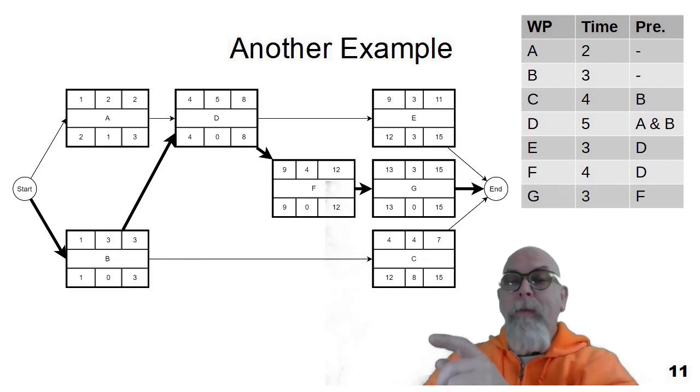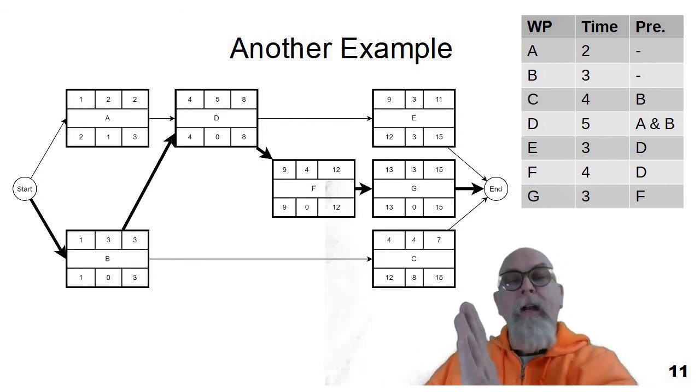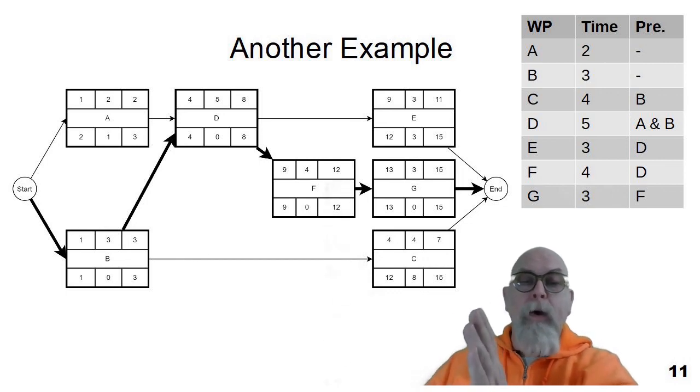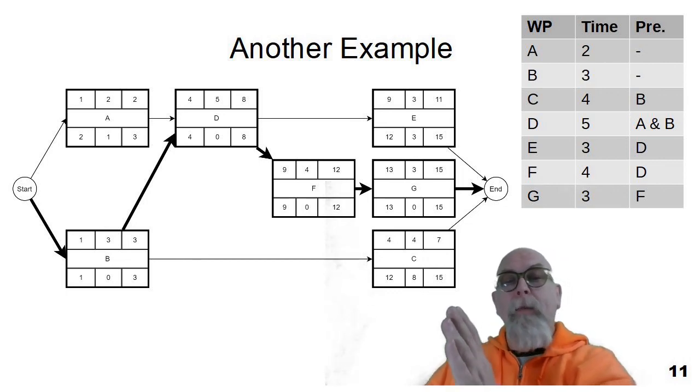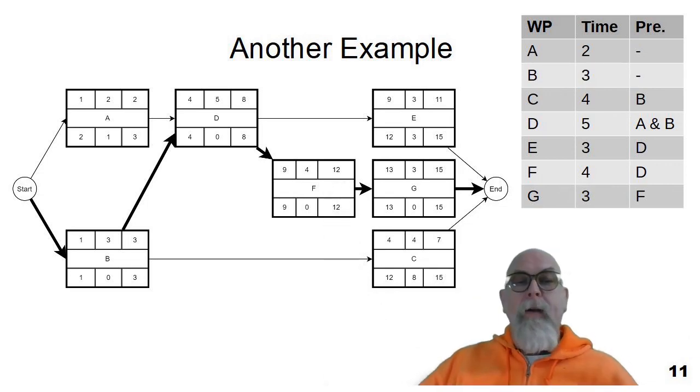We go from start to B to D to F to G. And you can see slacks of zero, where task A has a slack of one. So we can slide back and forth, either starting on the first week or the second week, without causing any problems to the project. Task E could start anywhere between the ninth and twelfth week. And task C can start anywhere between the fourth and the twelfth week. So we have wiggle room to schedule our employees better, knowing all of this with early start, early finish, late start, late finish, and slacks.